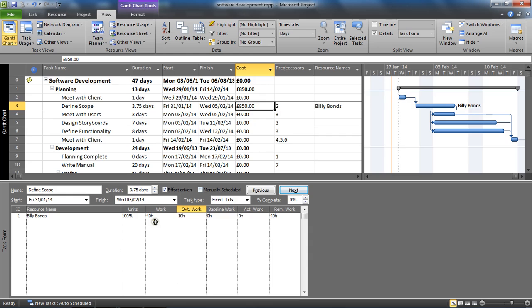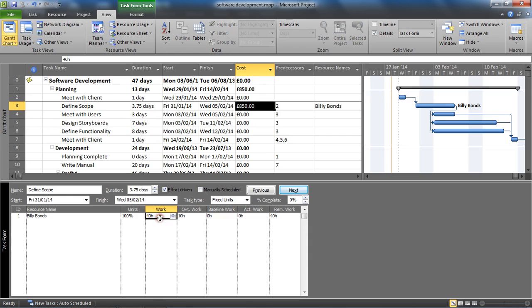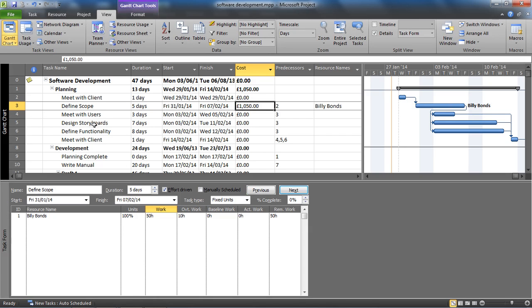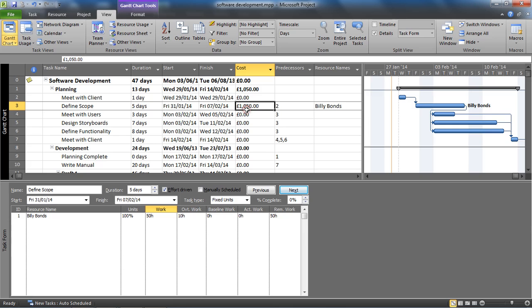I'm just going to change the work column to 50, so 50 hours work and 10 hours overtime work. It changed back to five days duration. We can see the cost increase. Now it's including - in fact he's doing 40 hours at 20 pounds an hour, and on top of that we have the 250. So it's 800 plus 250 now, one thousand and fifty pounds.